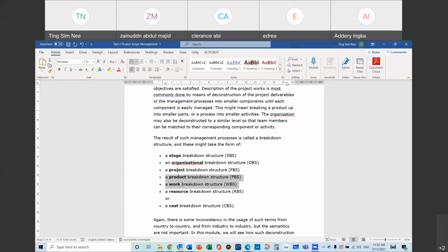We call it investigation, technical investigation studies that will go on, and then you start to do some preliminary ideas of how the project will look, some drawing, some dimensioning, and how many piers, how many footings, how long, how wide, how big is the freeway, is it 4 lane, and is it going to link point A to point B and point B to point C, and how the freeway will actually function and run. How many layers of a freeway that you're going to be building, how many circles that you'll be going around, and how many links that you are building.